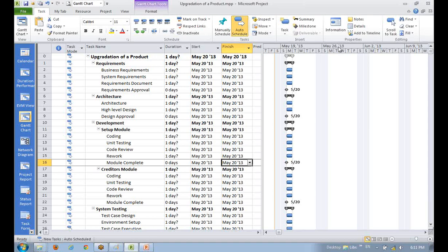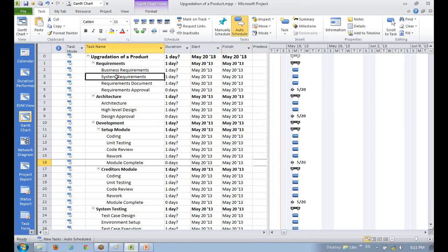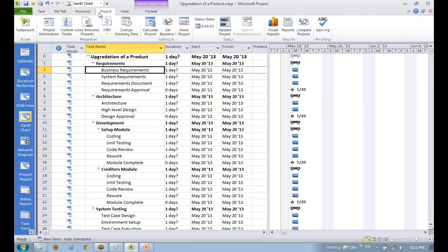Vivek, let's discuss the conceptual learnings from these 3-4 examples. For example, in the latest one, I guess the learning is that because the start date was 18th, when Rajesh manually changed the start date to 20th, all the task modes were changing to manual schedule. Correct? No, it doesn't change to manually scheduled. The only problem is that we are at the end of the day, and if you have the project starting at the end of the day, it will move to the next Monday, and that is why the date was appearing different. But as soon as he changed the start date,